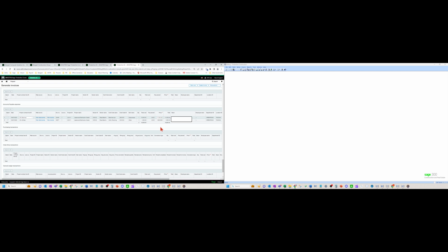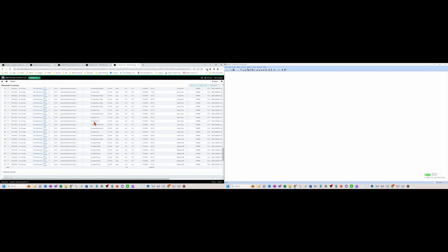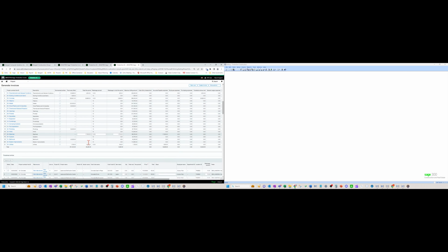Okay, so either or, you can adjust it here or up top in the summarization section. So it's both available. Notice it adjusted it for me up here, because that was 18,000. Okay. So now I know that I had set this up to have a maximum billing of $1,725. Also, it's telling me right here, my maximum billing is $1,725. So I have an $1,800 bill in the system, but I've already billed it out in total.